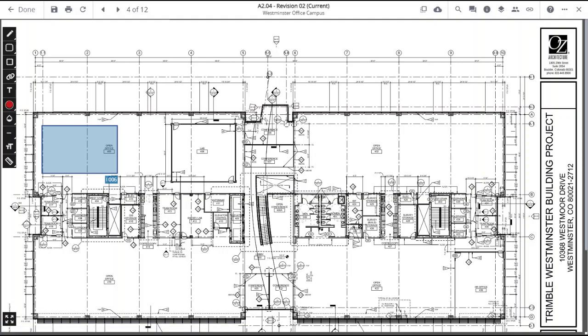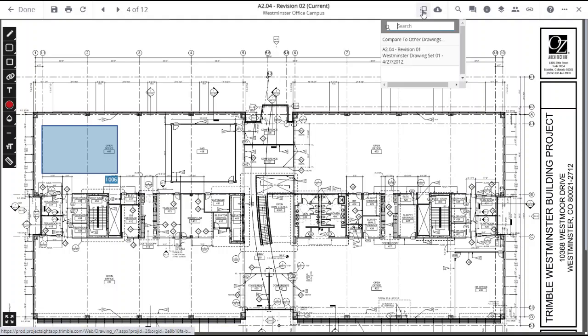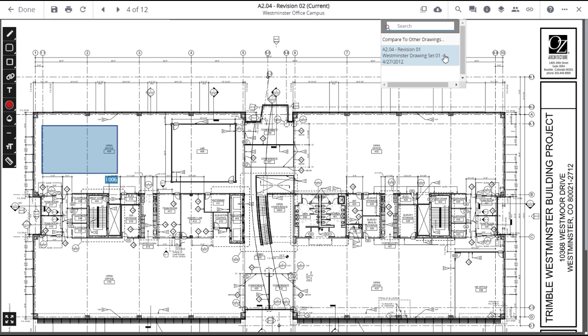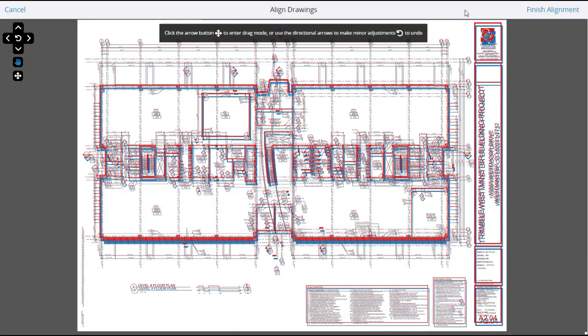To compare drawings, click on the Compare Drawings icon in the upper banner. In the drop-down, you can search for a specific drawing or select a drawing from the list. The two drawings will most likely not overlay exactly and you'll have to align them.